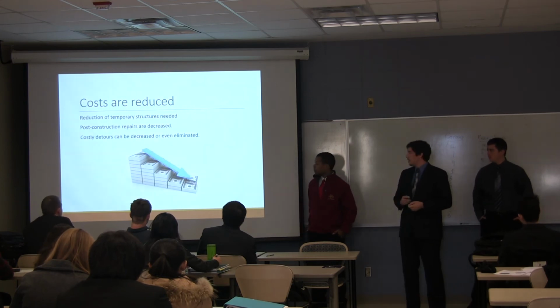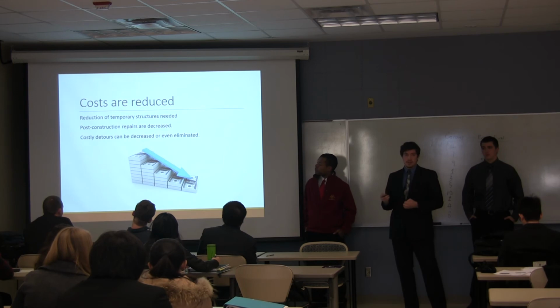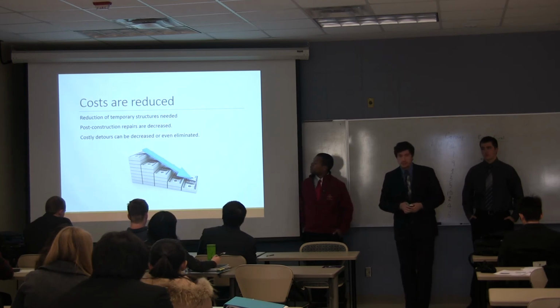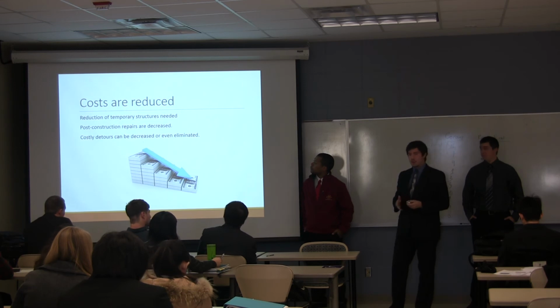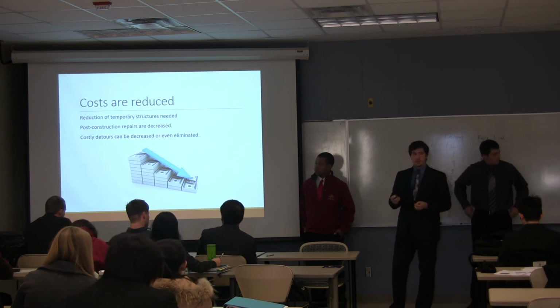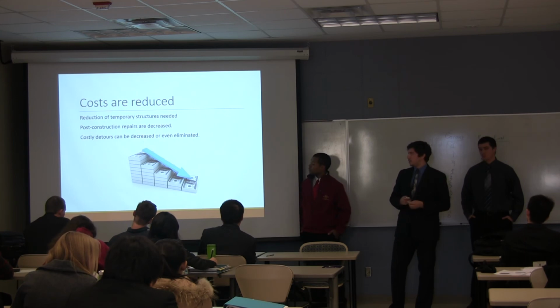And costs are reduced. You don't need to have the temporary structures. You don't need post-construction repairs, which are due to detours going along roads that aren't meant to handle high traffic levels that involve construction. Side roads just can't handle all the construction repair.